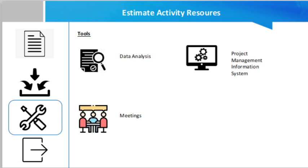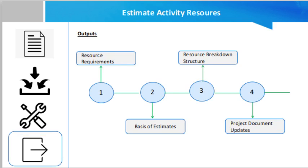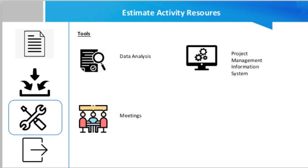Data analysis techniques used in this process include alternative analysis, to evaluate identified options in order to select the options or approaches to use to execute and perform the work of the project. Project management information system can include resource management software that can help plan, organize, and manage resource pools and develop resource estimates. Depending on the sophistication of the software, resource breakdown structure, resource availability, resource rates, and various resource calendars can be defined to assist in optimizing resource utilization.